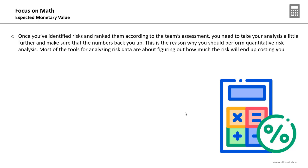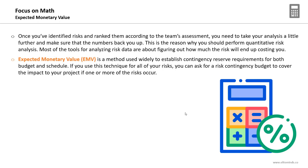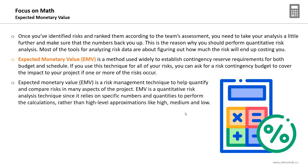Most tools for analyzing risk data are about figuring out how much the risk will end up costing you. The Expected Monetary Value (EMV) is a method used widely to establish contingency reserve requirements for both budget and schedule. It provides a scientific method of determining the exact required contingency reserves for your project. If you use this technique for all of your risks, you can ask for a risk contingency budget to cover the impact if one or more identified risks occur. EMV is a quantitative risk analysis technique since it relies on specific numbers.